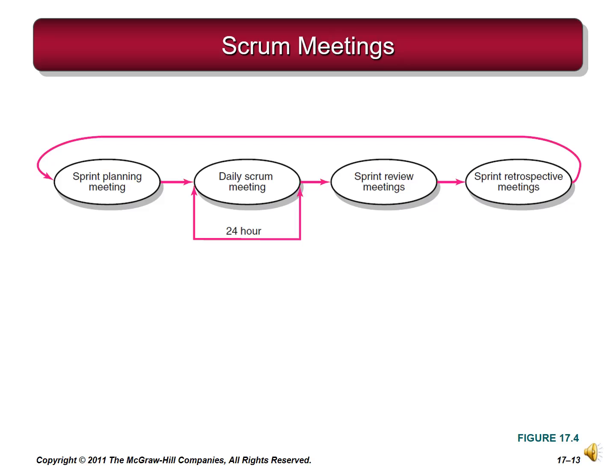The daily Scrum is the heartbeat of Agile project management. It is the daily meeting commonly referred to as the Scrum. Each work day, at the same time and place, team members stand in a circle and take turns answering the following key questions. What have you done since the last Scrum? What will you do between now and the next Scrum? What is getting in the way of you performing your work as effectively as possible?